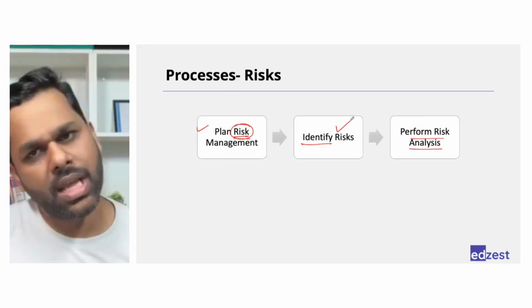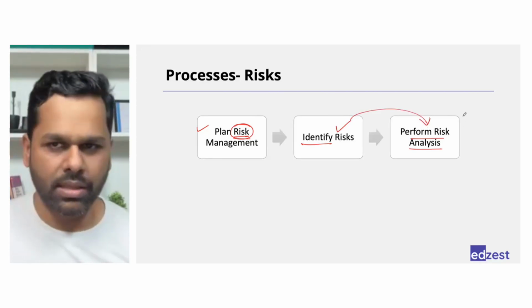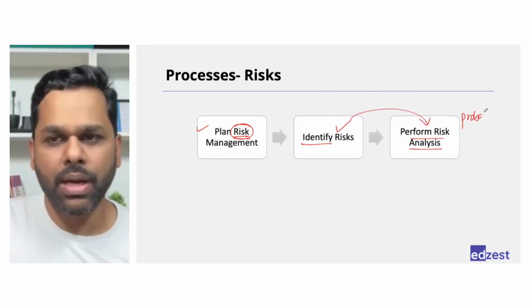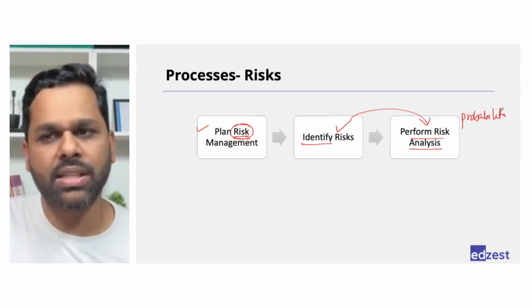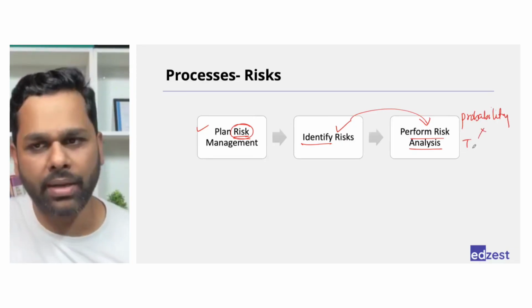Then perform the risk analysis for all the risks that you identify. As soon as you identify the risk, start performing the risk analysis. This is where you try to understand probability, which means what are the chances that the risk will happen, and impact.